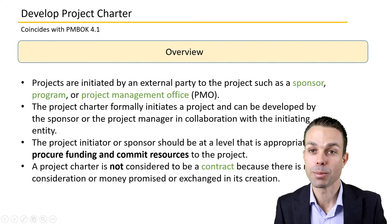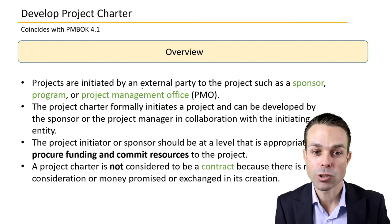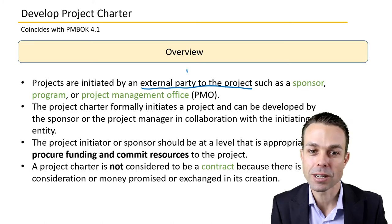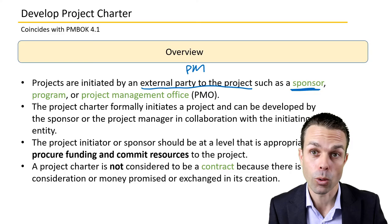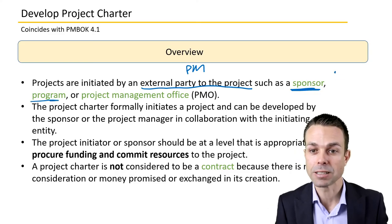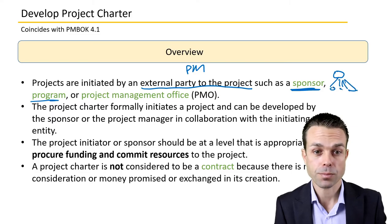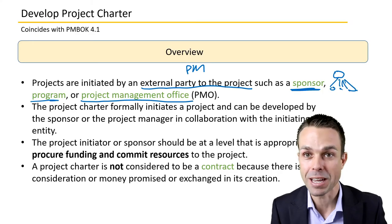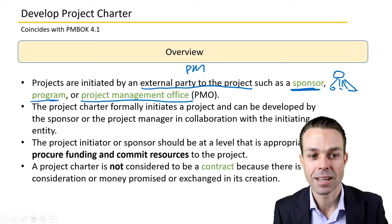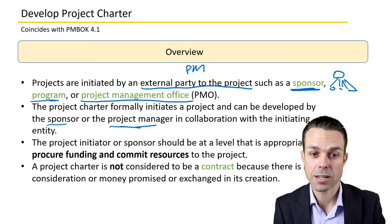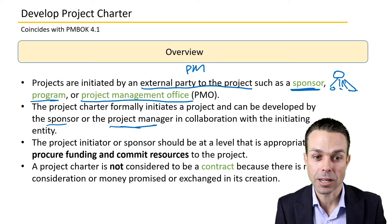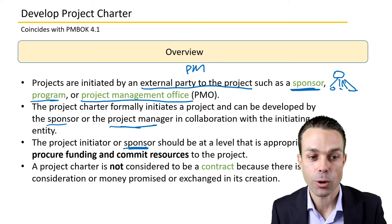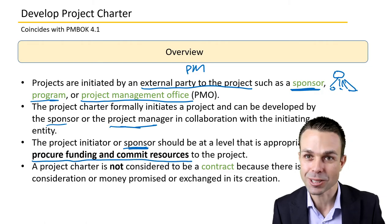For an overview of developing our project charter: projects are initiated by an external party to the project — usually not the project manager themselves. Instead, it's a sponsor — someone who might own that part of an organization, or perhaps the overarching program that looks after a bunch of projects, or a project management office if you're working in a PMO environment. The project charter formally initiates that project and can be developed by the project sponsor or the project manager in collaboration with the initiating entity, depending on the organization.